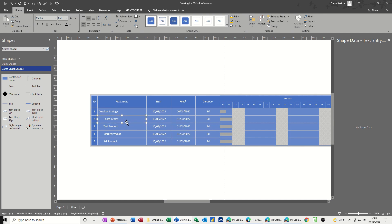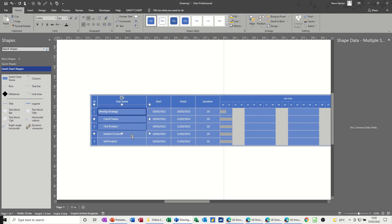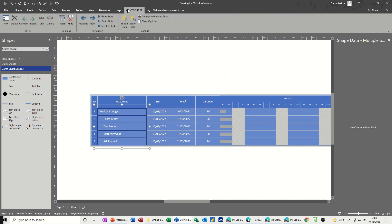Now if you want these to be linked, if I click on the first one, if I click on that one actually, and then this, this, this, and then this, what you can, if you go onto the Gantt chart tab is you can link these, like so, and then they're all linked, and you can see the information flowing forward.